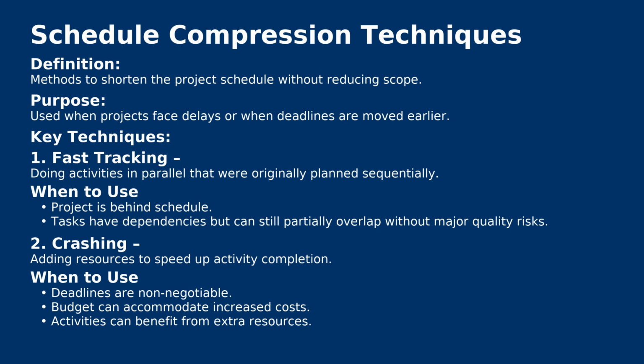You need to shorten the schedule, and at the same time, the scope should not be impacted. You should shorten the schedule without impacting the scope. This is where schedule compression technique comes into picture. You will have to compress the schedule whenever there is a project delay, or there could be a request from a customer to shorten the schedule due to market demands. You have to manage the schedule without changing the schedule baseline, which is nothing but the authorized time-phased budget for the project.